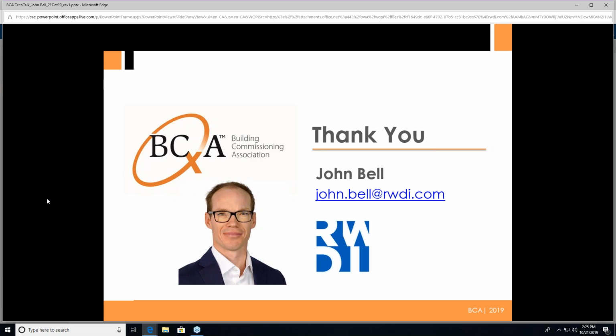Yeah, good question. I don't personally have expertise in setting this up. You would deal with a third party. There are lots of vendors out there for building analytics systems. They come with a standard package of rules that are based on, of course, ASHRAE and lots of other organizations as far as how a system should operate. Those are normal, but they can be customized. So the commissioning provider can customize some of those rules. When you're looking at a system that's not currently provided through the analytics, or at least there's not a set of rules there for a one-off system, then of course you can customize those. So if you're looking at time, you need to confirm whether you're going to run an off-the-shelf analytics, or maybe bake in some additional time with your analytics provider so that they can provide some of that support as well.